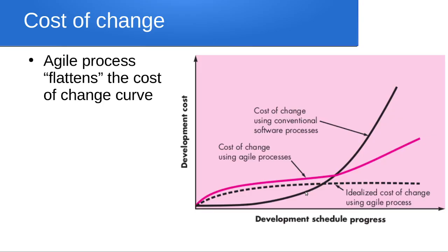So we have to understand the requirement first. If we understand that the requirement is very simple and it can be frozen, for this particular thing we can use the conventional method. Because whatever the requirements are, they are quite clear and may not change in future, then we should go for the conventional process. However, in most cases nowadays, we understand the change requests will keep on coming. So if we recognize even a single bit of confusion, that yes, a change request might come, we can go for the agile process, where we can move very fast.